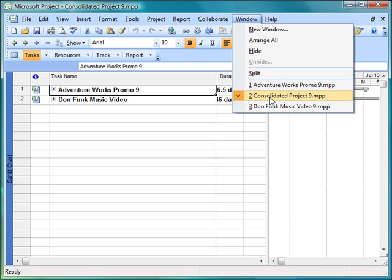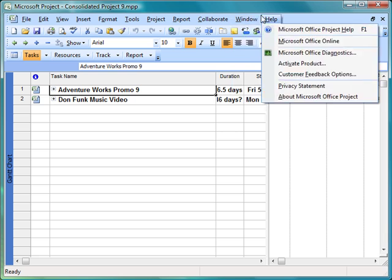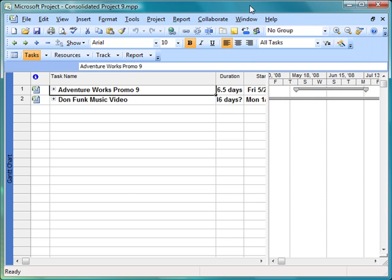That is the Consolidated Project 9, Adventure Works Promo 9, and Don Funk Music 9. Now what I'm being asked to do in this particular exercise is to create a link so that when I am finished using the video editing equipment in the Adventure Works Promo 9, I can use it then in the Don Funk Music Video 9. So I have to create a predecessor task.